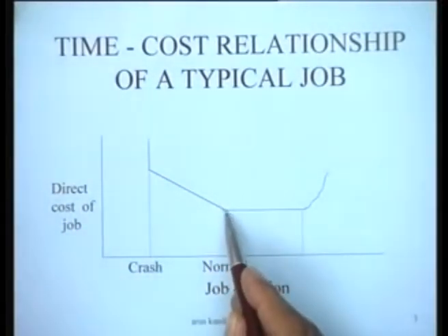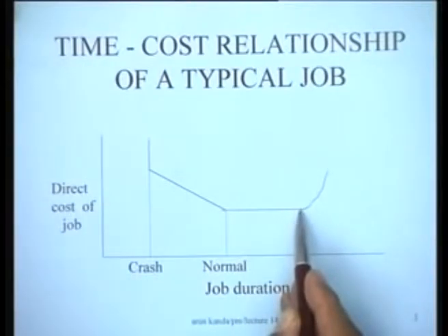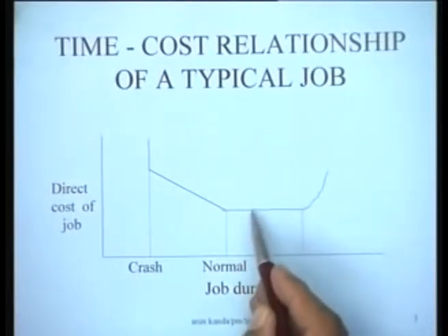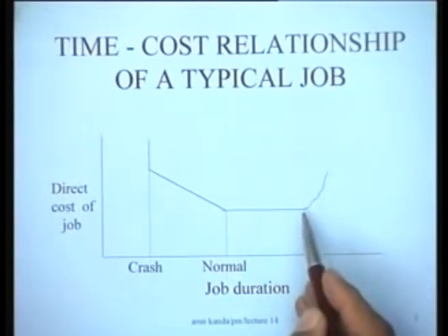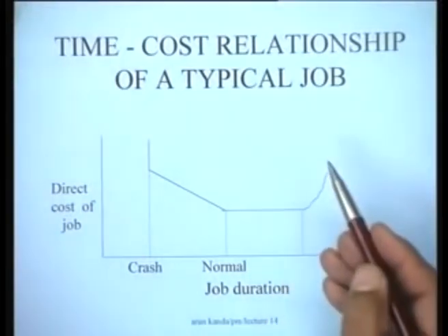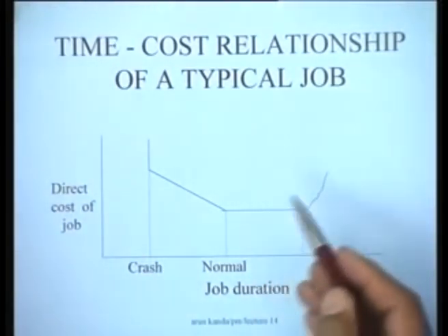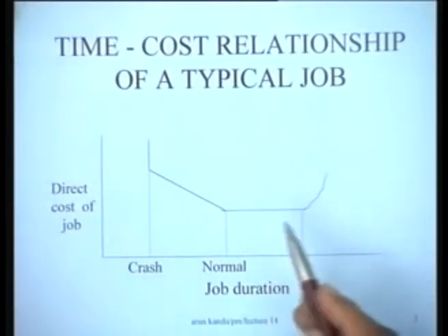It is quite likely that if we delay the job for some time, the cost is not going to change. But thereafter there are going to be penalties of delay. The delay could mean you had bought certain material and the material goes bad, right? So the costs keep on increasing.